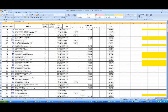This spreadsheet is intended to summarize the completed construction. Well, it does a couple things for us, but we use it during construction to keep track of what's built, and that comes to us through Contract Manager. We'll explore that link in a second. But at the end, it gives us the total cost of putting a ramp in that location. So what we have now is a cost that we can associate geospatially by moving this data back to GIS, and that's what indeed we did.